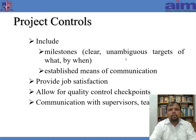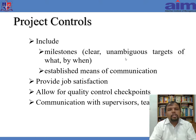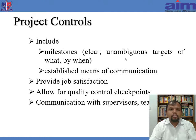The next step is project controls, which includes milestones that have to be very clear. For house construction, the first milestone could be completion of piling, the second completion of the basement, the third completion of the first floor, and the next completion of the second floor — each with a clear completion date. Provide job satisfaction, because if team members are not satisfied, they may quit and people are a major resource of a project. Allow for quality control checkpoints and communicate with the team and supervisors throughout the project, as communication is the utmost important aspect of project management.